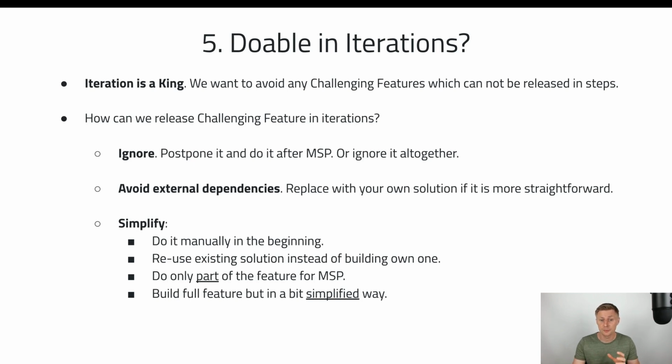Every time we had a new purchase on our marketing website, we got a new notification from Stripe service about that payment. Then we went to our Opasta admin panel, created a new user account manually and shared access details with our users over email. Yes, it was all done manually every time. And that was fine. Initially, we didn't have a lot of new signups daily, so we decided to add this automation a bit later. So you can think about your list of features the same way and decide if you need it all for the first version or maybe you can postpone some of them.